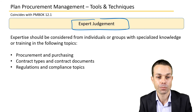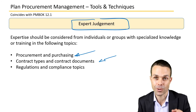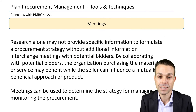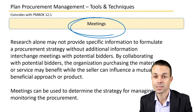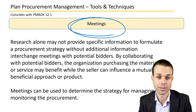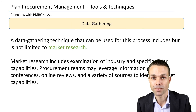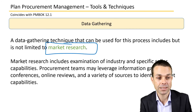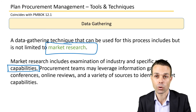Tools and techniques for plan procurement management include expert judgment from people with procurement and purchasing knowledge, the legal department for contract types and documents, and expertise on regulations and compliance topics. Meetings are also needed to tie all items together, since research alone may not provide specific enough information to formulate a procurement strategy. We may need to meet with potential bidders so they can showcase what they can do, and meetings can help determine the strategy for managing and monitoring the procurement. Data gathering through market research includes examining industry and specific seller capabilities without needing to go through a full bidding process.